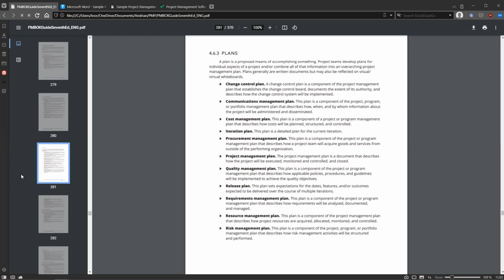Like, let's say you're launching a data center, you need to procure certain hardware. So this needs to go into procurement management: who is responsible, where the money comes from, when this is done. So this is not always relevant, but important to know that it's a separate part of the project plan.